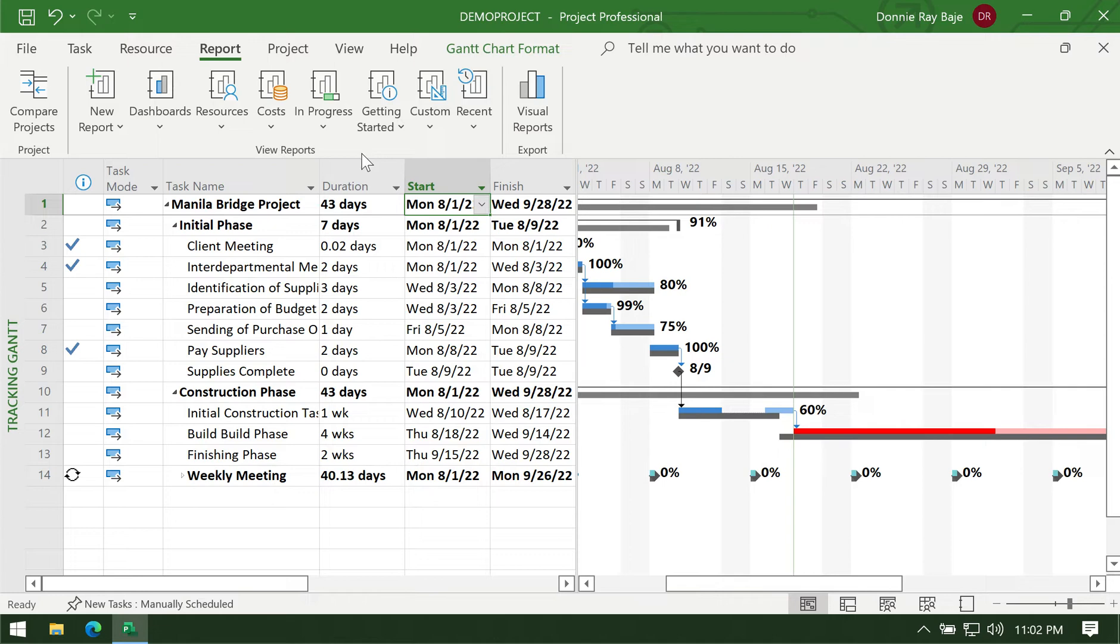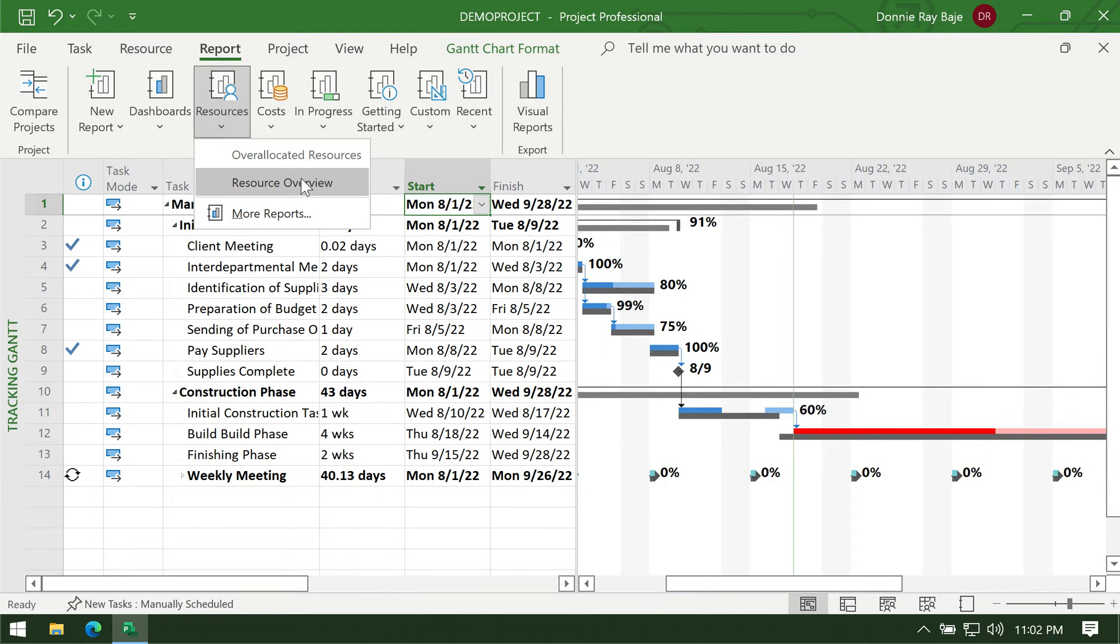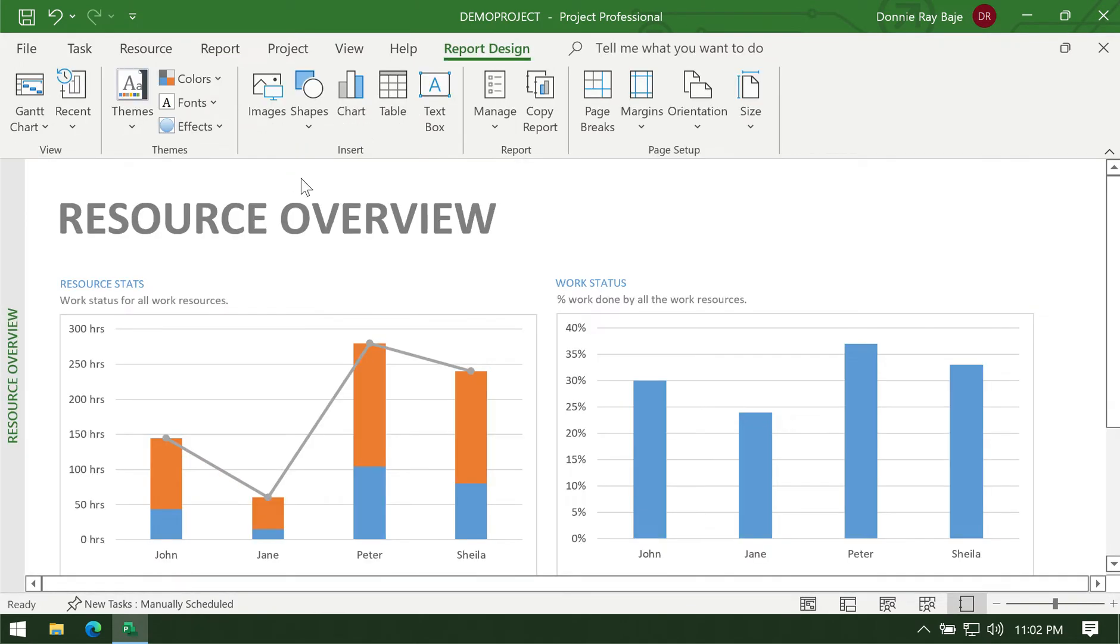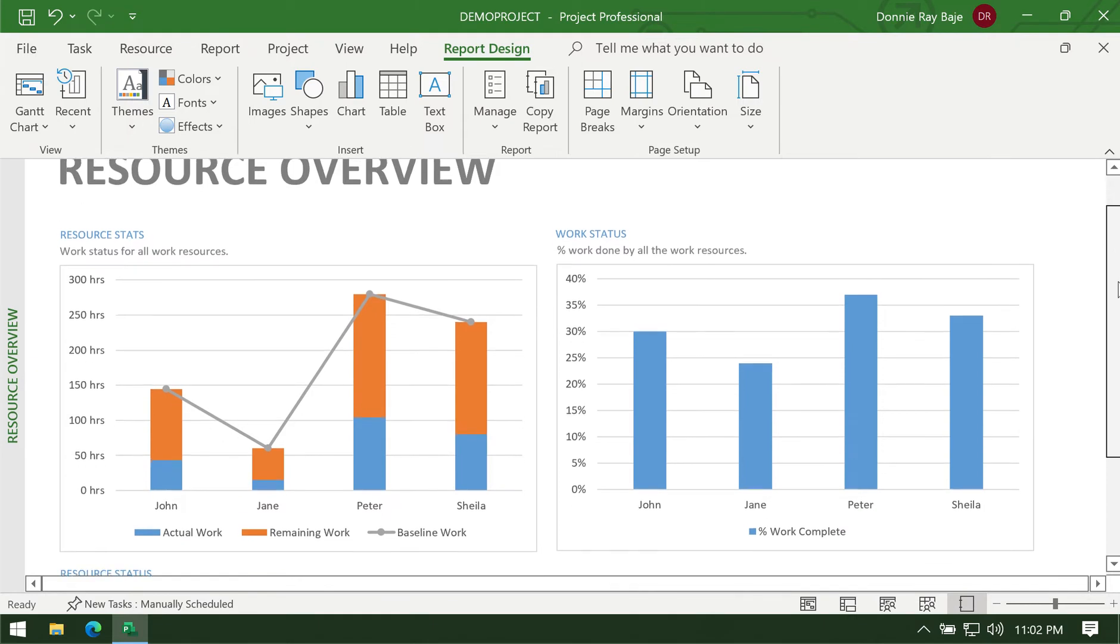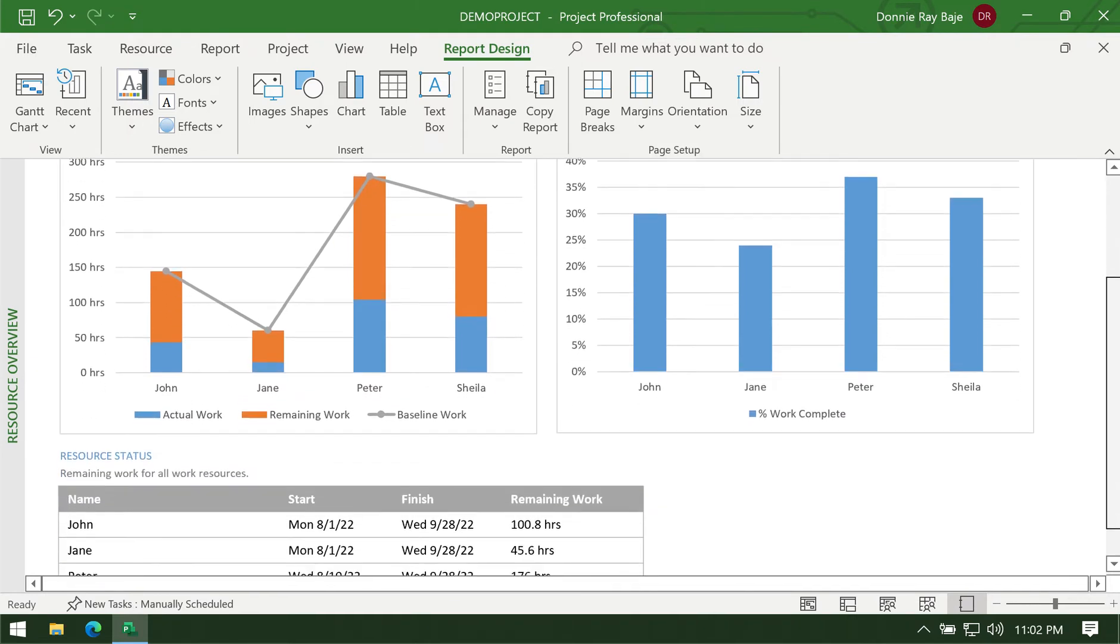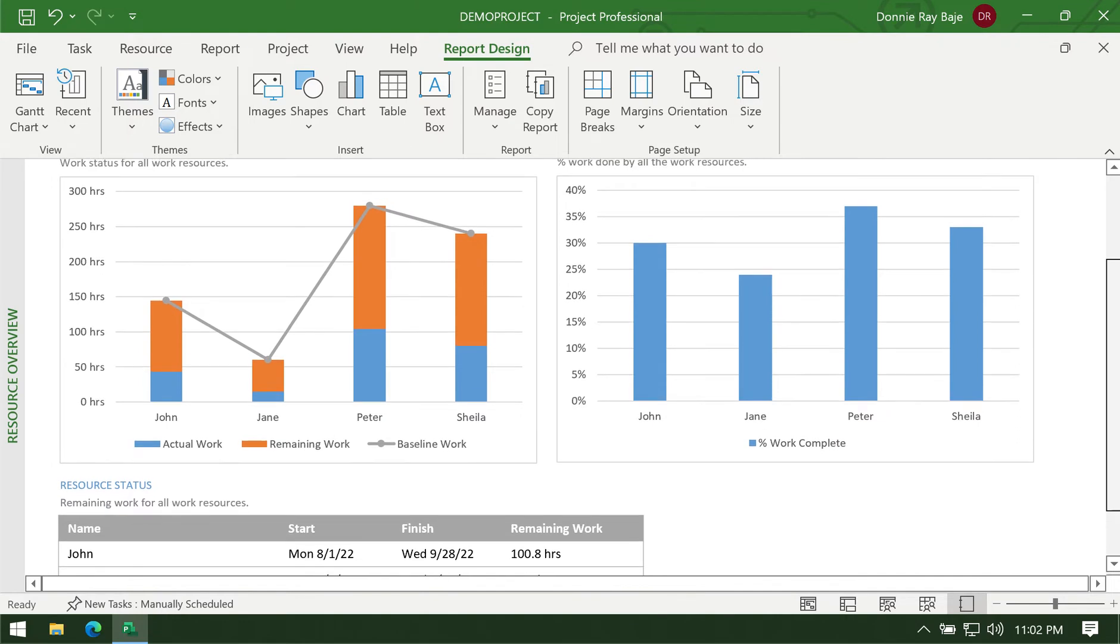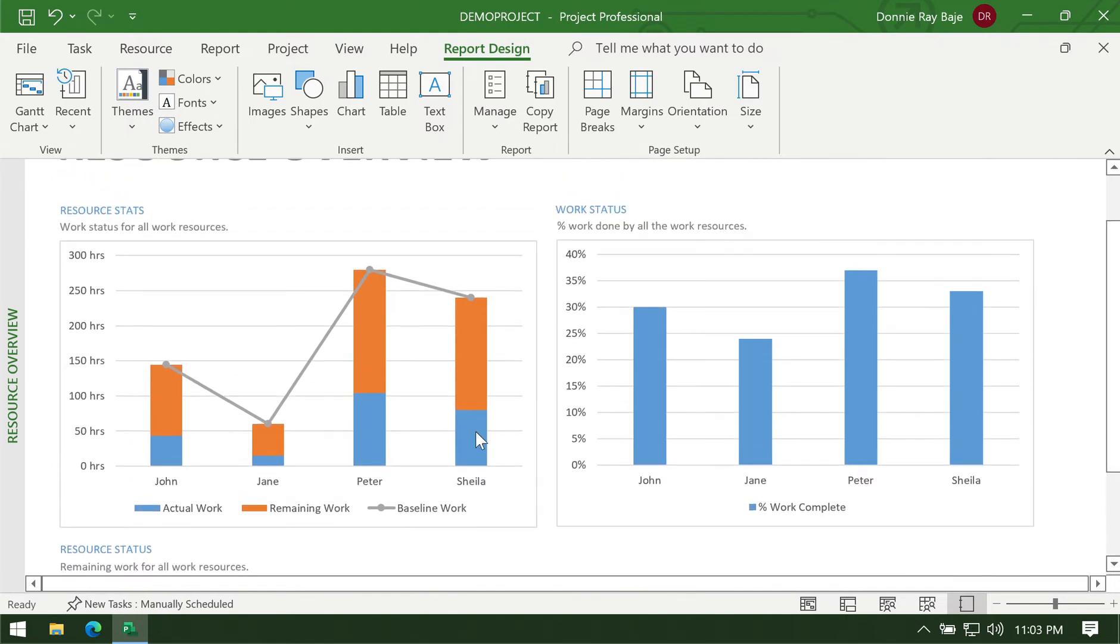Let's go through some of the notable reports in the Reports tab of MS Project. The first one is all about resources. All you have to do to generate the report is dropdown whatever category of report you want. Let's say for this one I want to see resource overview, and this shows you the resource people and how much work they have done. We have here John, Jane, Peter, and Sheila. Peter seems to be the one who has the most number of tasks to do or the most number of hours dedicated for these tasks, while Jane has the lowest.